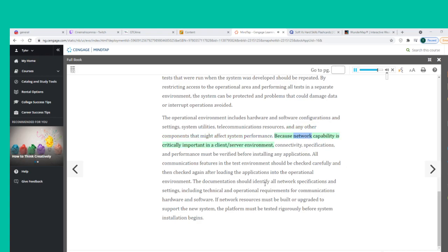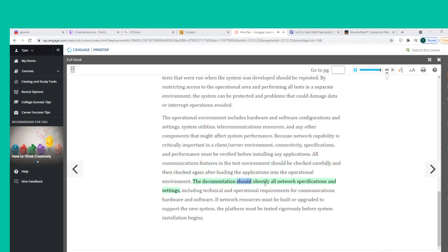Because network capability is critically important in a client-server environment, connectivity, specifications, and performance must be verified before installing any applications. All communications features in the test environment should be checked carefully and then checked again after loading the applications into the operational environment. The documentation should identify all network specifications and settings. If network resources must be built or upgraded to support the new system, the platform must be tested rigorously before system installation begins.